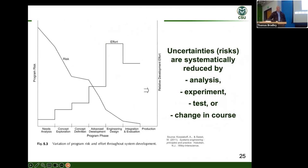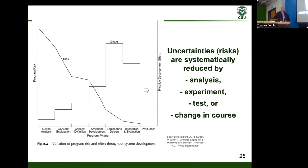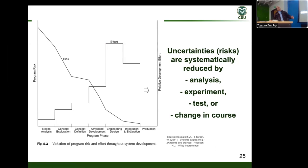We've spoken about objectives: we don't want to wait until the end, so we're trying to get risk down as early as possible in the program. The phases on the bottom use the Kossiakoff model going through needs analysis, exploration, definition, engineering development, and then post-development including production. The idea is we hit the risk hard on the early side, and don't let it compound late.